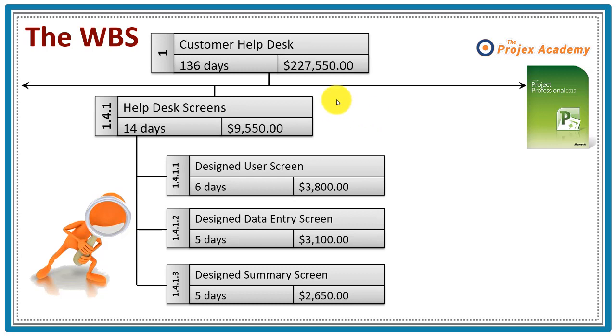Now, over the past few years, the PMBOK guide has moved quite correctly towards recognizing that what you should be focusing on at the higher levels of your work breakdown structure are the products or deliverables. And you break these down into levels that would normally be represented at a work package level. Because this is just an example here, I'm showing you the typical information that you could store within Microsoft Project after you have brainstormed this in a workshop.